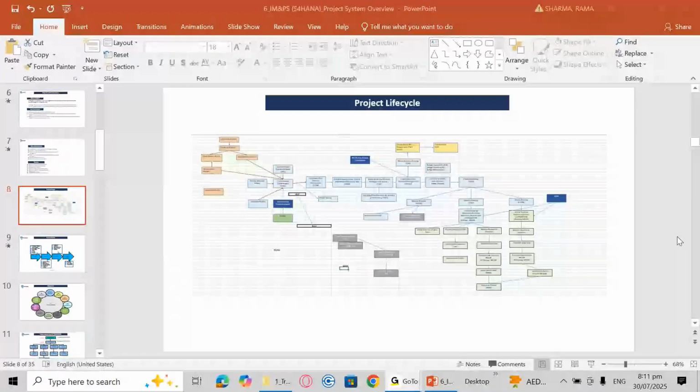Okay, and apart from that, what is next? It is helping us to control the business transaction also, right? Yes, correct. On a certain status, you can perform certain transactions. Here, let's say when your project is in a created status, you cannot post any actual cost to your PS objects like WBS or network activities.